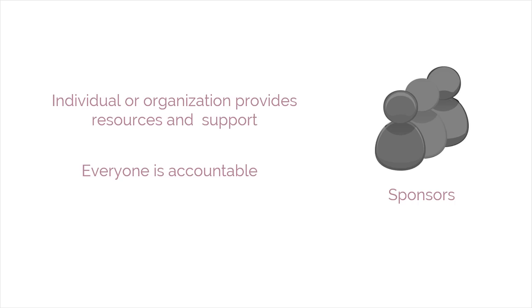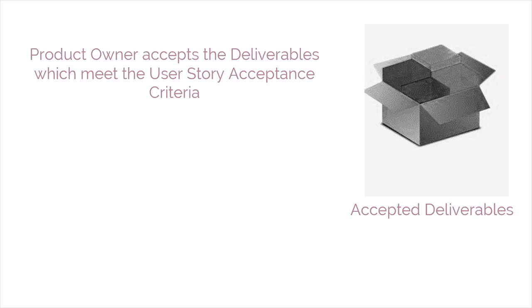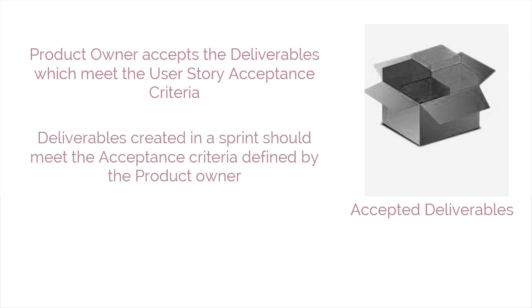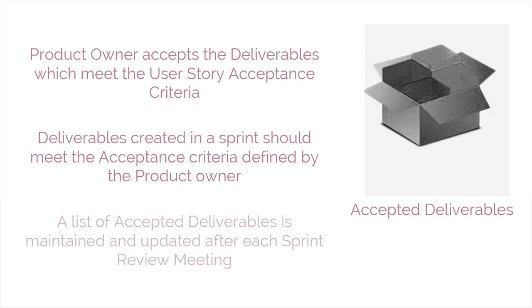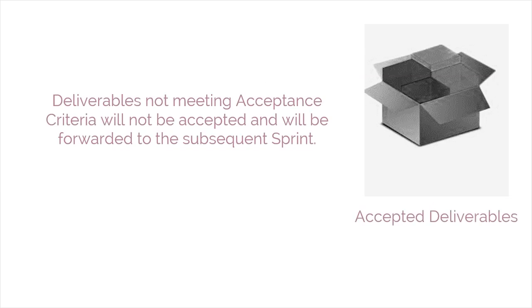The next source of input is accepted deliverables. Deliverables which meet the user story acceptance criteria are accepted by the product owner. The objective of a sprint is to create potentially shippable deliverables or product increments which meet the acceptance criteria defined by the customer and product owner. A list of accepted deliverables is maintained and updated after each sprint review meeting. If a deliverable does not meet the defined acceptance criteria, it is not considered accepted and will usually be carried forward into a subsequent sprint to rectify any issues — this is highly undesirable because the objective of every sprint is for deliverables to meet the criteria for acceptance.